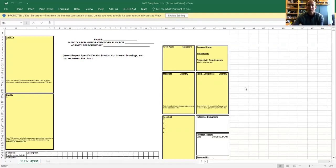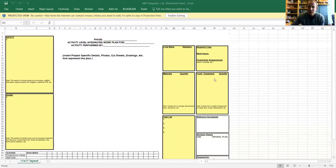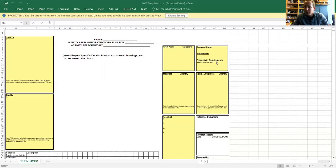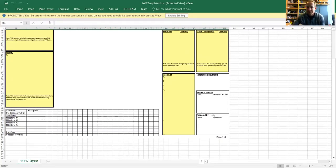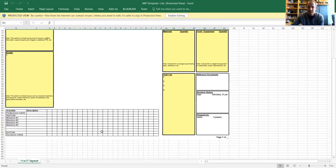In the upper right corner you've got crew name and signature, and over to the right you've got required crew size, how many work hours, and productivity requirements. Below that you've got materials and quantity, and to the right of that, tools and equipment and quantity. Estimate this stuff — it doesn't have to be exact, this isn't estimating class, but have a good idea of what's going into this task. Then come up with a task list of what you need to do. Reference documents might be your plans, specifications, or your OSHA book. At the bottom, include your schedule milestones and describe those milestones in a simple block schedule.